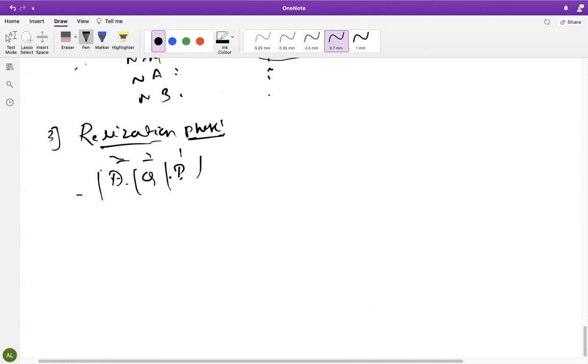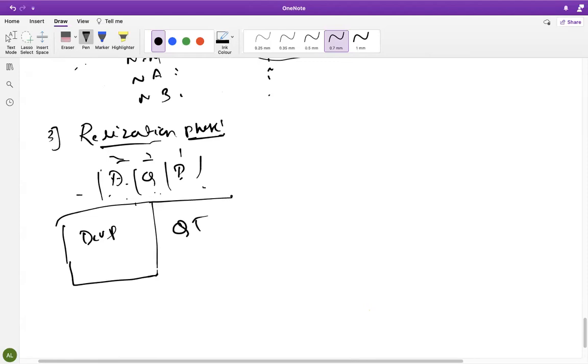Okay, so in the realization phase, what will happen here? Our initial server installation will happen, and whatever we have promised in the business blueprint, we'll bring it to reality. All the configuration we'll do here in the development server. Here we have the development server, quality server, and we have the production server. Okay, my handwriting is the worst. In the development server, we will do the initial configuration. Whatever we have made as a document, we'll do all configurations here.